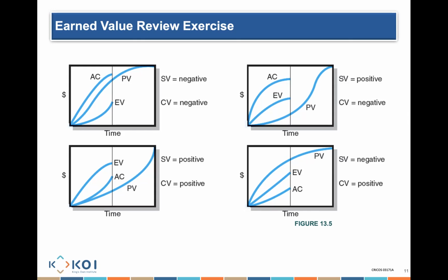Giovanni, want to say something? Ahead. Okay. If I'm earning less than what I'm planning to earn, because I was planning to earn more, if it's negative, it's always behind. Behind. Okay, so if I earn that much and I was planned to earn more, then because I've earned less, I am actually behind my schedule. But thank you for trying.